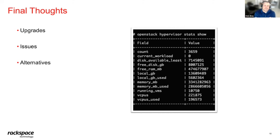The plan we followed when we did the upgrade was let's just upgrade it all at once, but still stick with upgrading by groups. So in one weekend, we upgraded the MCP, and then we upgraded all 3,600 computes, and it took us roughly 48 hours to do it all. That really wasn't the best way to do it, though, because since we were under such a time constraint, we didn't necessarily have the time we needed to validate each one of those distinct components post-upgrade. So yes, we blew through the MCP upgrade.